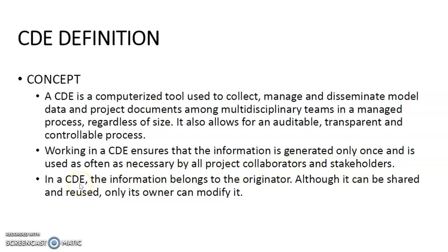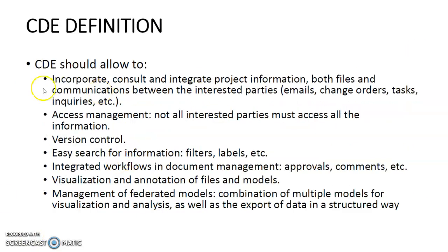In a CDE environment, the information belongs to the originator, although it can be shared and reused. Only the originator or the owner can modify it. CDE should be allowed to incorporate, consult, and integrate project information, both files and communications between the interested parties. For example, emails, variation orders, tasks, inquiries, and so on and so forth.